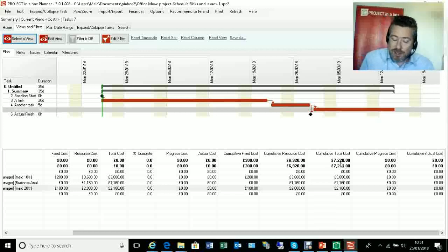So it's doing all that stuff for you and making sure you don't miss out on anything. If you put somebody in here and you've got them costed as a rate, they're going to appear in that overall cost of the project. Of course, you can choose to add a margin on if you want to. You can copy and paste this data out into Excel and play around with it. But this is about building up those fundamentals for you.